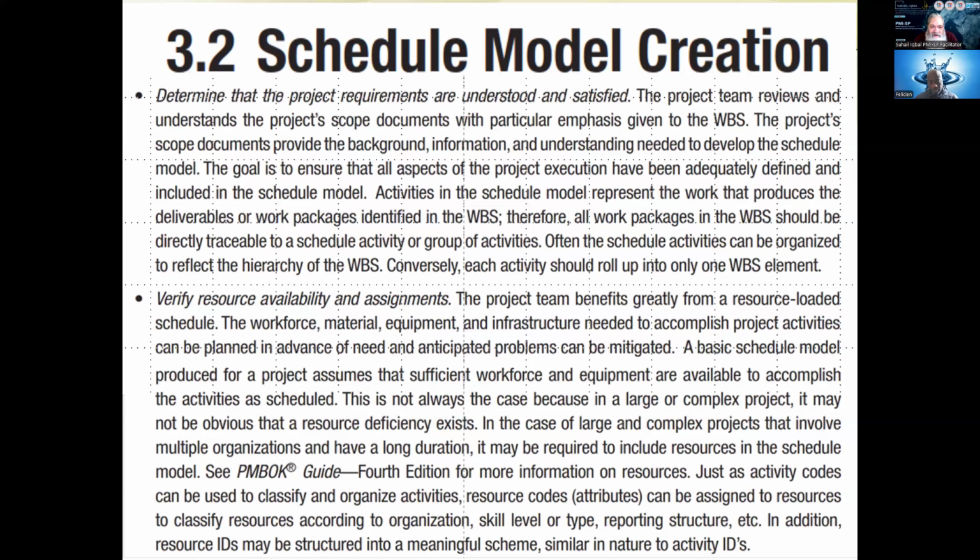This includes the workforce, materials, equipment, and infrastructure needed to accomplish project activities, and can be planned in advance of need, and anticipated problems can be mitigated. So this is actually the main force behind the schedule, because due to non-availability of resources, the schedule is not workable. So loading these resources onto the schedule will make it a resource loaded schedule.